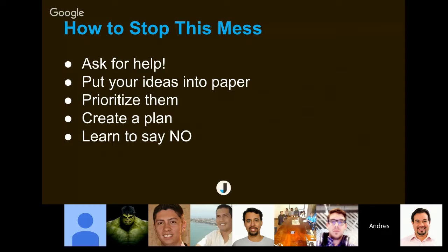So, this concept of why, the 5 whys of Toyota. You start asking why 5 times. Okay, why was this feature not uploaded? And then the guy said, it's because I didn't pull the changes. Why didn't you pull the changes? Because I didn't know what changes to pull. Why didn't you know what changes to pull? The theory goes that if you go 5 levels into why, you're gonna find the problem.